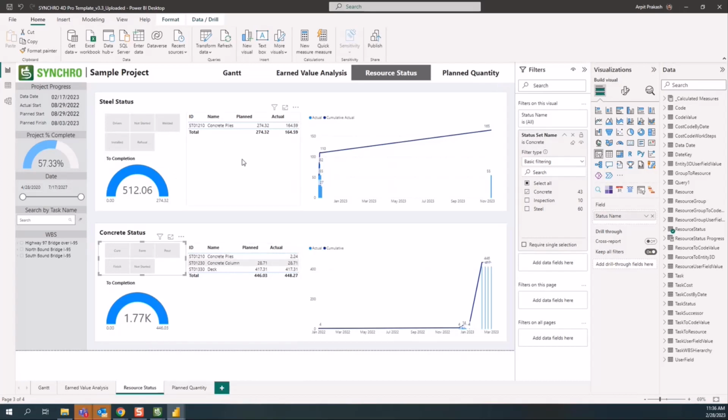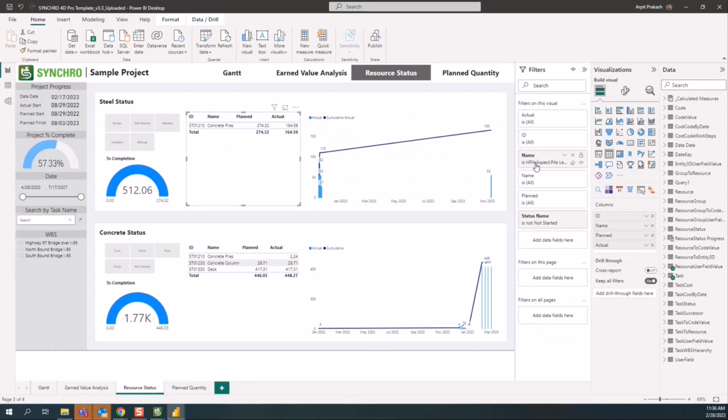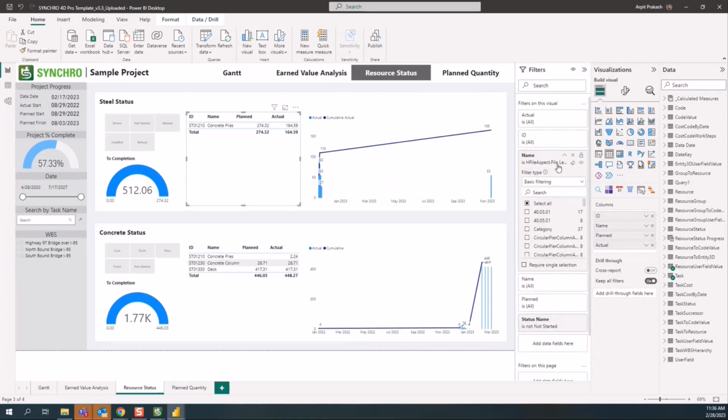And so the same thing applies for all of these filters within a section. This one, I'm using a plan quantity called by length from a user field. So you can come here and search for a specific user field for that specific category. It could be your surface, volume, weight, whatever user field you want to use. You can select that one, and that's what the data is going to display.